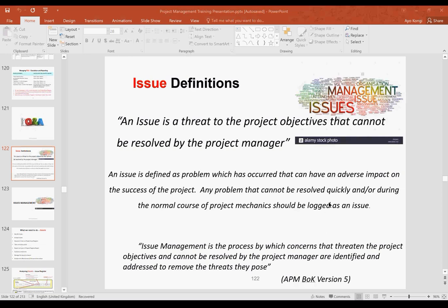Alright, Patty is asking, so the absence of the laptop in the earlier example was an issue? No, it wasn't an issue. Don't forget we said there is a risk of Madame not being available. So if we identify that risk and we now discover that Madame has even traveled for the next 10 days with her laptop, an issue has happened. We identified the risk that there's a probability of Madame Mayor's laptop not being available when we need it. It has not happened.